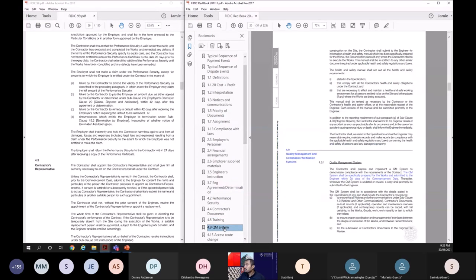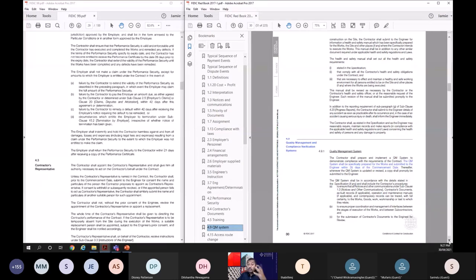Yeah, I'll go to the QM system now. Quality management and compliance verification. So this is a new provision, again, FIDIC 2017. Quality management system. The contractor shall prepare and implement a quality management system to demonstrate compliance with the requirement of the contract. Okay. So he should prepare a system, quality management system. The QM system shall be specifically prepared for the works and submitted to the engineer within 28 days from the commencement date. Yeah. Thereafter, whenever the QM system is updated or revised, a copy shall be promptly submitted to the engineer.